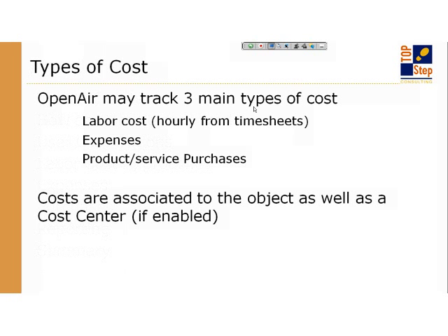And those are usually treated as things like a vendor purchase order or something called a quick purchase order or a quick PO as it's known in OpenAir, which basically records a cost against the project, maybe something like a fixed price subcontractor cost or some type of material cost like a server or a laptop that you've had to purchase.